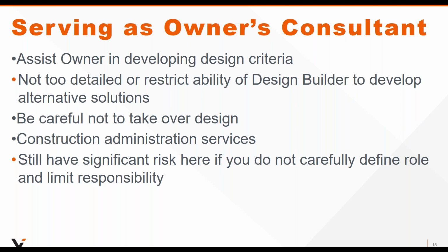They were obligated to follow it, and therefore it's because of that information that the design builder incurred these additional costs, and therefore you're responsible for them. So it's always, as the owner's consultant, you have to be mindful of not opening up your owner to those types of claims by being too prescriptive. You could still have significant risk here if you don't carefully define your role and limit your responsibility.